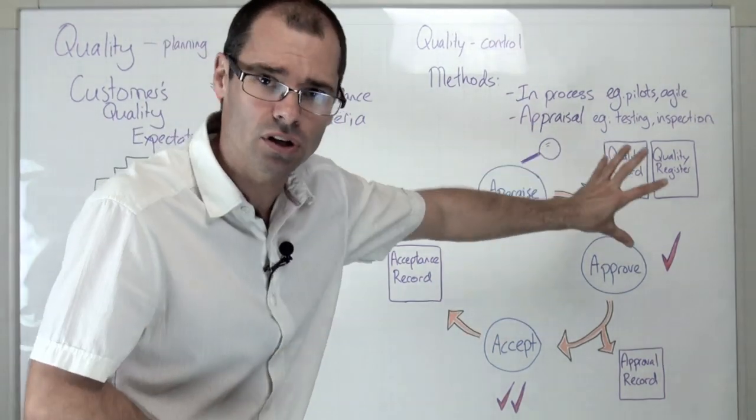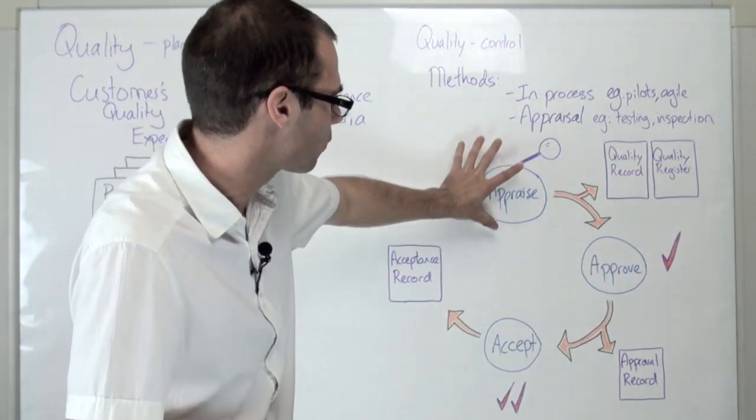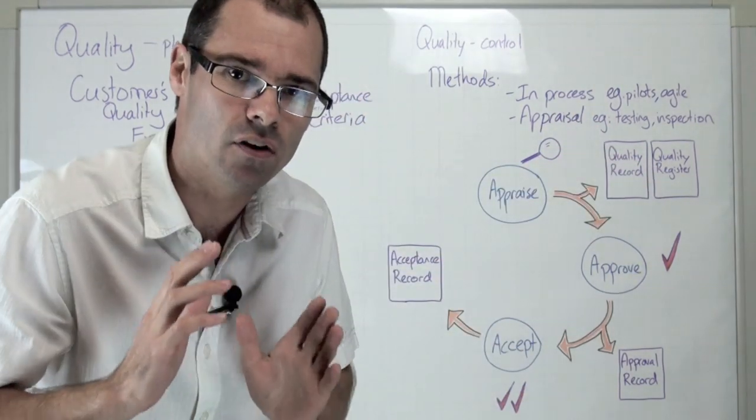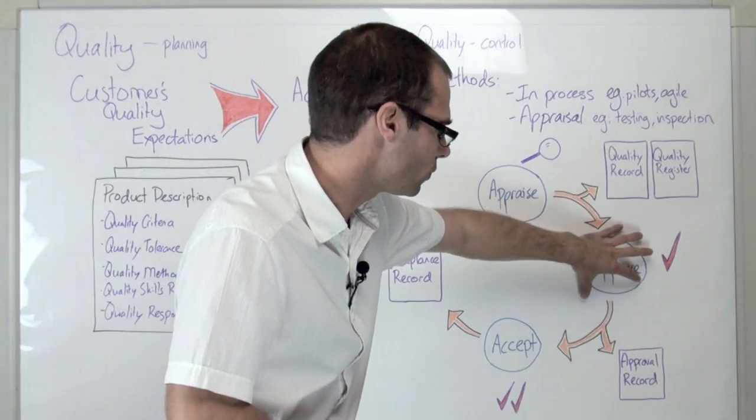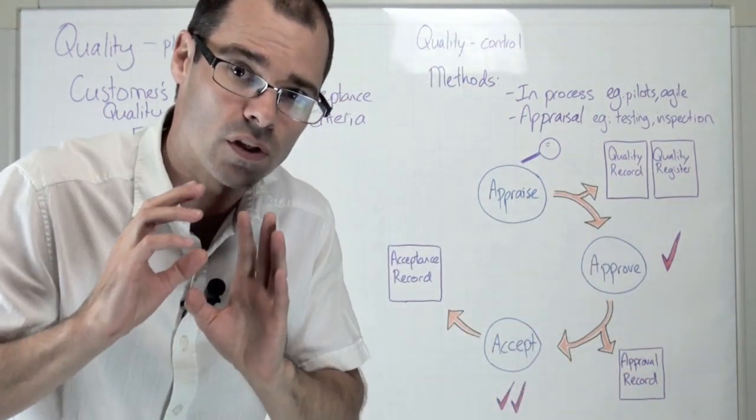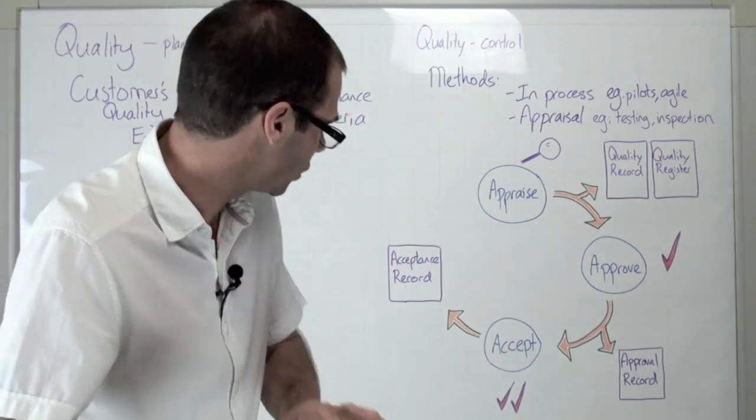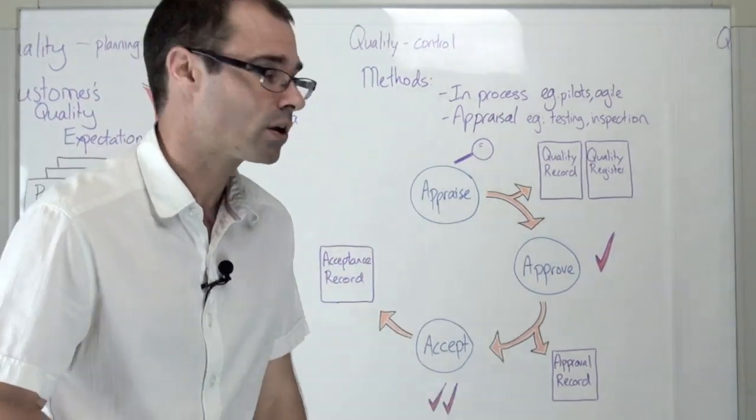We have three steps within quality checking in Prince2. We've got the appraisal of the product, which involves creation of a quality record and update of the quality register. The approval step involves creation of the approval record. Finally, we have accepting the product and accepting the project, which involves creation of an acceptance record.